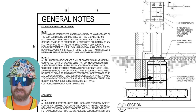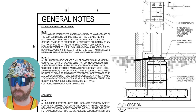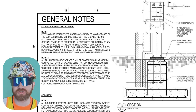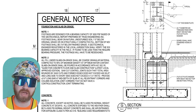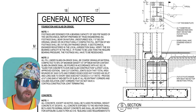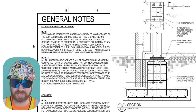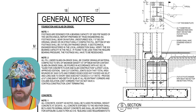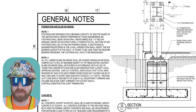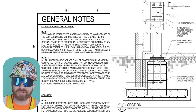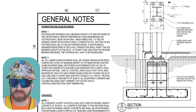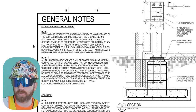From there, we have anchor bolts in the foundations which lead to the base plates, shown to be grouted with structural steel on top. You'll have to coordinate the majority, if not all, of your structural components before you ever pour any concrete, because the rebar and anchor bolts are embedded in the concrete. This is one of the most critical steps in construction. The steel layout is only as good as the base plate layout embedded in the foundation, and the foundation is only as good as the soils and compaction underneath, as required by the geotechnical report.